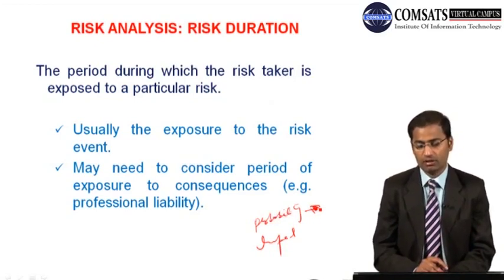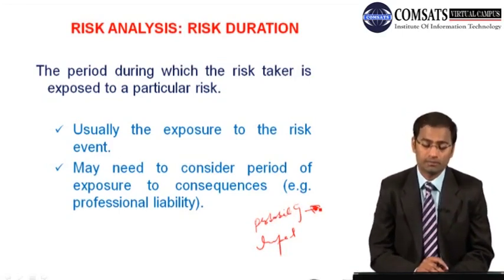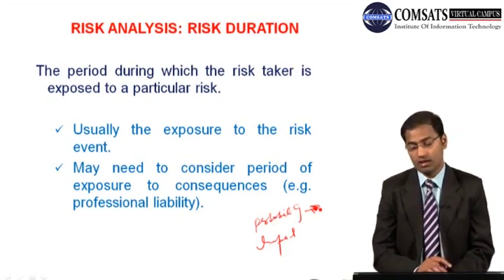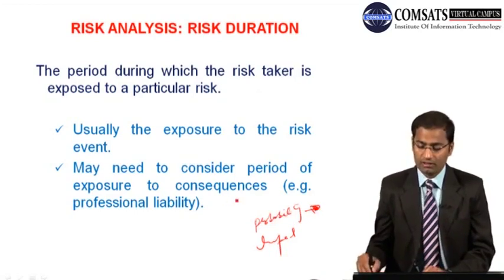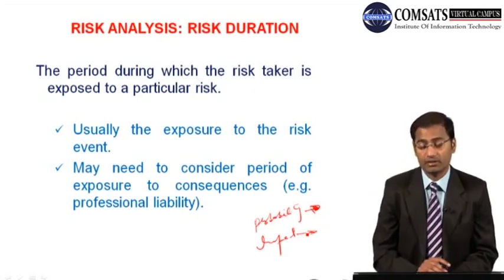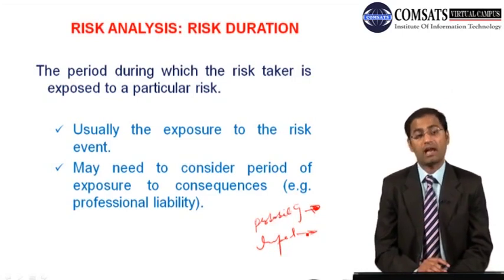And then we discussed decision trees, fault tree analysis, and event tree analysis. Fault tree analysis is helpful for the assessment of the probabilities of the event, whereas event tree analysis can also be used for probability assessment. As far as impact is concerned, we do know that impact is not that well evaluated with fault tree analysis, but can be calculated by event tree analysis, and decision trees are helpful for assessment of that impact.